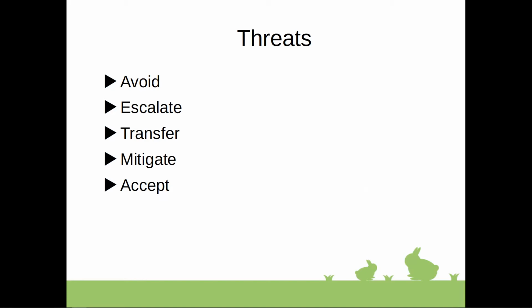It basically will mean that either this threat is of no big impact towards the project objectives, or there are no resources to deal with it, and project objectives will be reached regardless of this threat. Actively accepting a risk can include developing a contingency plan that would be triggered if this event occurs. But it can also be a passive acceptance, essentially doing nothing.